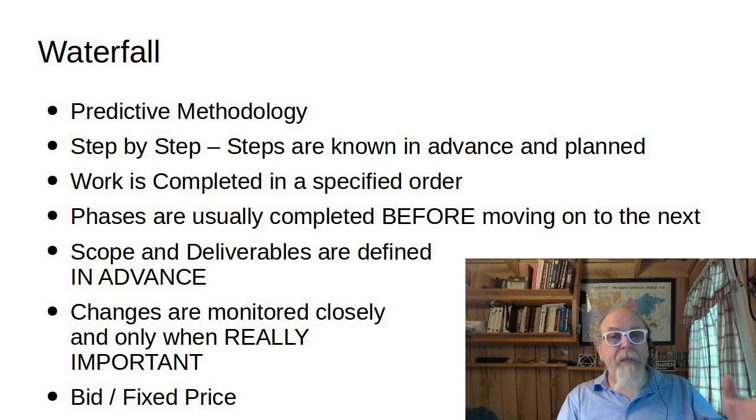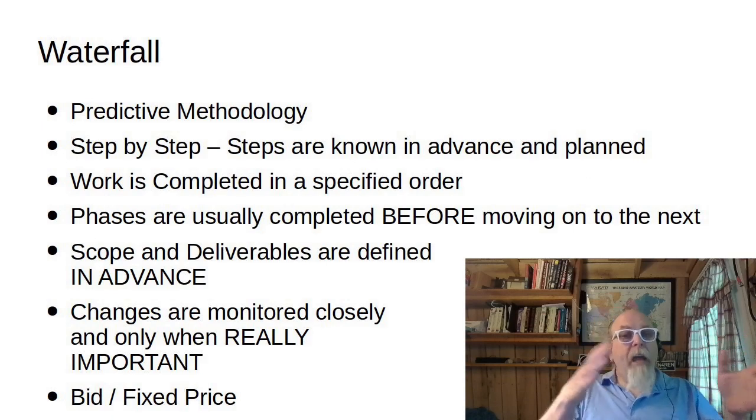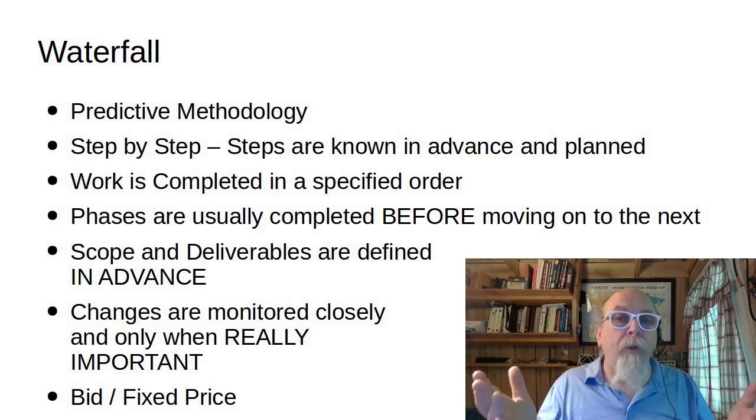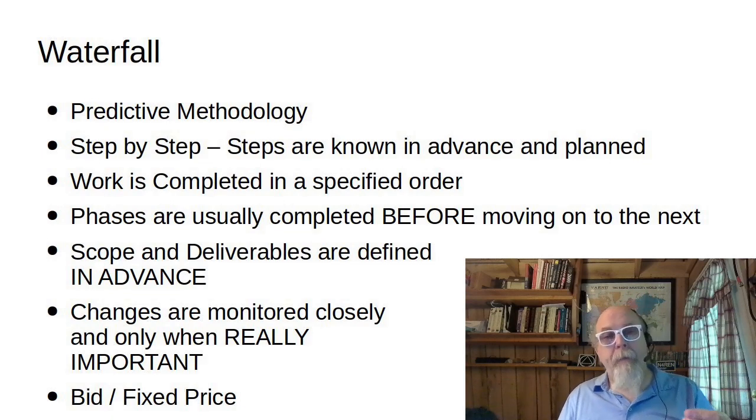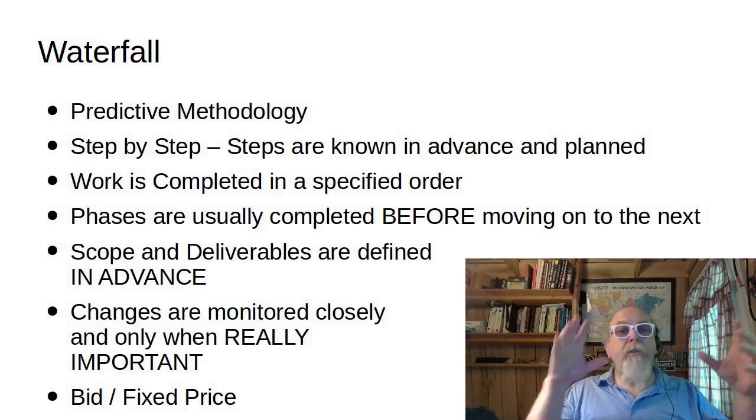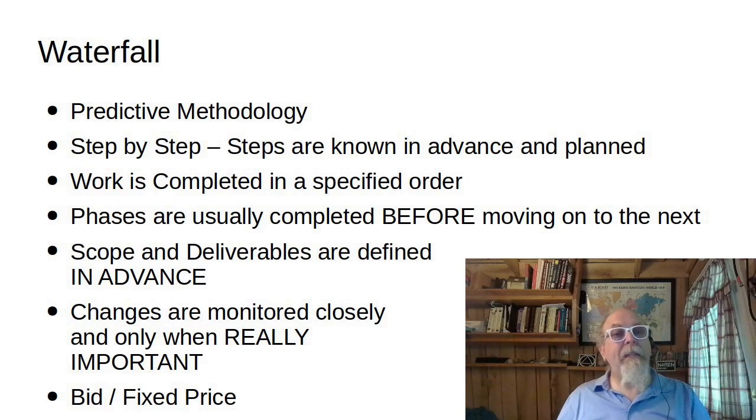You do the groundwork. You dig the ditches. You lay the foundation. You pour some of the concrete, and you've got to do it in a specific order. You can't throw the roof up without the walls being up first, or without some of the structure being up first. You can't put the plumbing in. Well, you can put some of the plumbing in if you're going to put the plumbing in grade, but you can't do the sinks until you get the interior done. So there's a very distinct order that things need to happen in. And you can think of building a building, and sometimes building a tech project, in the classic waterfall methodology.